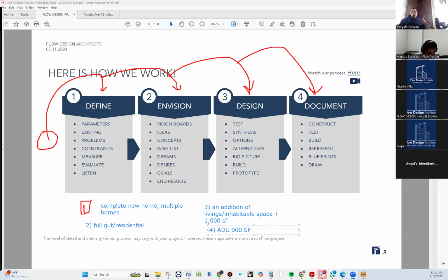All right. So ADU additions or any new home, a tiny home of 900 square feet, they will have to do it. There is a little gray area there, but they will likely have to do it. And I haven't spoken about what it is yet or any of that, but I want you to first know in the contract, am I going to be required to provide, or someone needs to be providing a Hertz rating, yes or no? Okay. Once you know that is yes, you need to ensure that your drawings reflect that a Hertz rating will be provided.